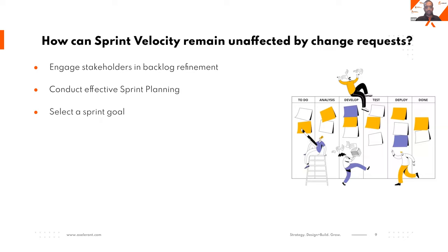One of the biggest mistakes we make, as part of an Agile antipattern, is that we never think about sprint goals. And this is the reason we easily get distracted from our Agile. Think about it: if the sprint goal is just to achieve a payment page and login page, then they have that as the value they have to deliver in the end. Any deviation that comes, they can compare with their sprint goal. Always have a sprint goal.